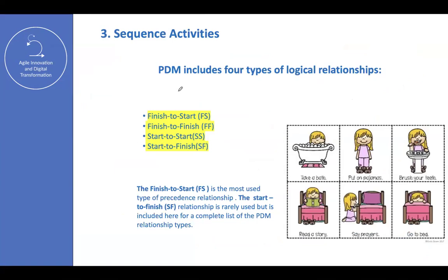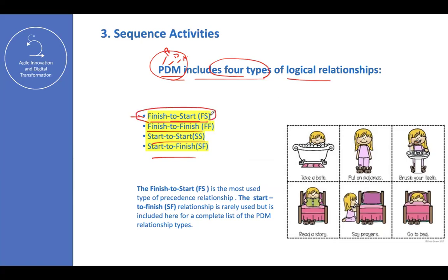So this is it. So now, PDM, anyone remember what PDM stands for? P is precedence, diagramming, methodology. All right, the PDM includes 4 types of logical relationships. Don't worry, we don't need to memorize this for the exam. We can have finish to finish, finish to start, start to start, start to finish. Thank God, for the exam we are going to focus on number 1, which is finish to start